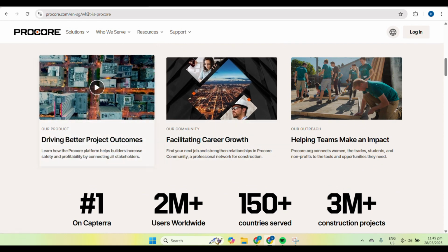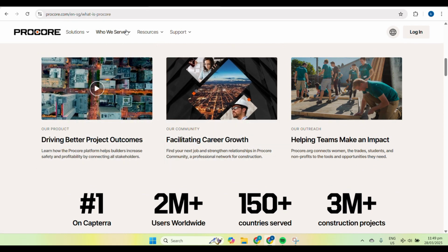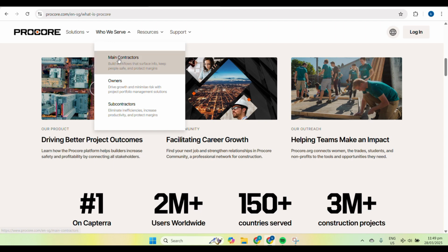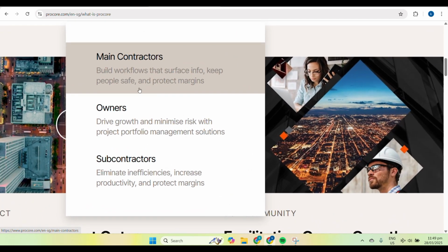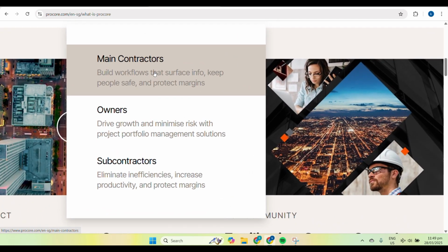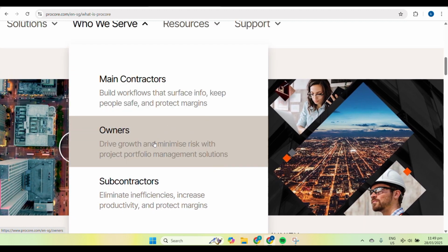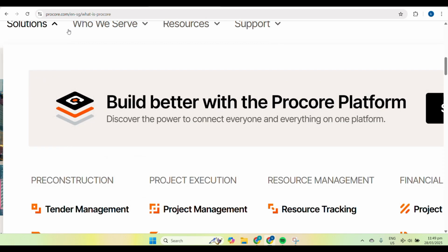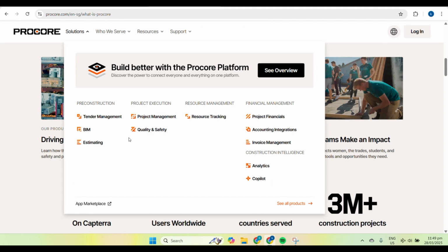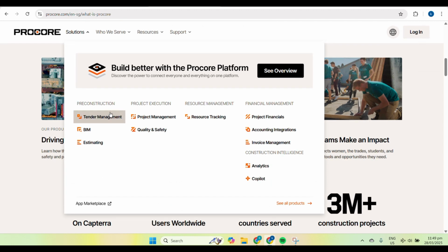If you're a reviewer, you will receive a notification when a submittal is assigned to you. To review it, you just need to go to the Submittals section, open the relevant submittal, and examine the attached file. Here you will have several options. If everything looks good, you can click Approve to move the submittal forward. You can also add comments or attach a markup file to communicate required changes.